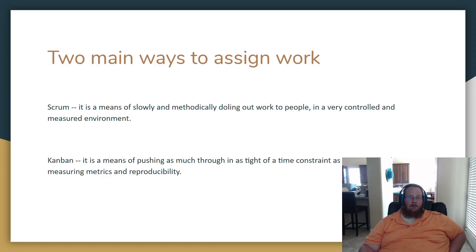And then you break it down even further and say, okay, well, this person in the past, the way they estimate says that they're capable of 12 units of work. This other person, the way they estimate, says that they're capable of 6 units of work. It doesn't mean that person 1 is twice as effective.